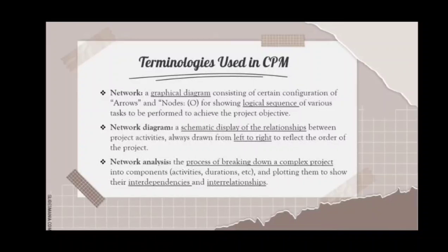Naturally, a project can have multiple critical paths. Indeed, if each path through the network takes the same amount of time, one may argue that the project has been optimized to minimize risk, given that all resources are fully utilized. Note that if your network has parallel paths, you can only make this work if you have resource flexibility to ensure that your resources are used effectively according to your plan.